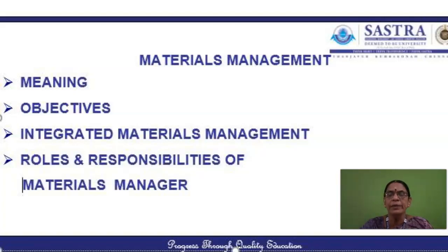We can go for open tender, wherein the advertisements will be given in the newspapers and the quotations will be received from the different suppliers based on the specifications issued in the tender notices. The suppliers will send the quotations in a sealed cover. The purchase manager will receive all the quotations and discuss them with the most important officials in the organization. Based on the price and the quality of the materials mentioned, they will select a supplier who has quoted the minimum price, but at the same time the quality will not be sacrificed, and they will place an order with the supplier. This is in the case of an open tender.